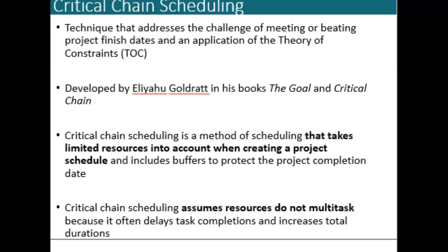So remember I mentioned buffers. If I have an activity that's 10 days, I'm going to cut it in half. I'm going to move that to the end of the project. And that time still exists, but I'm going to measure, as a project manager, the buffer use rate. That becomes my metric to measuring project success. And realize when I do that, I am impacting my resource management. So you have to work through those puzzles as we've discussed through these lectures in this chapter, right?